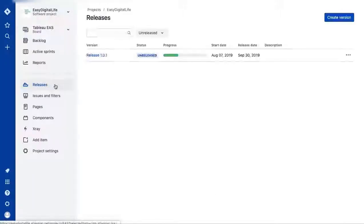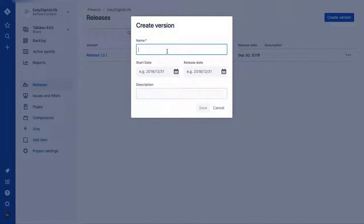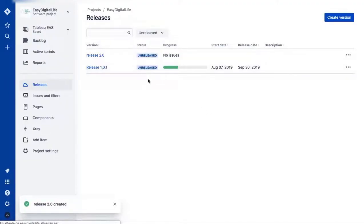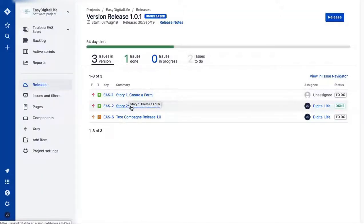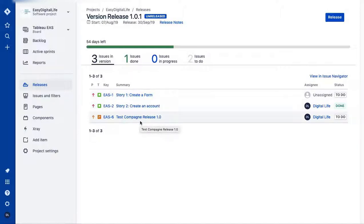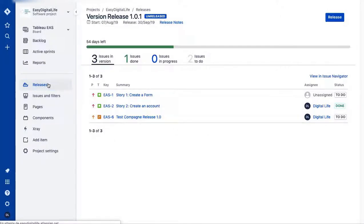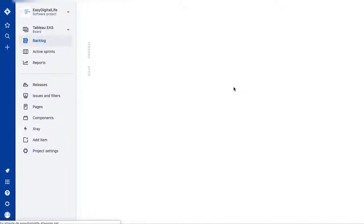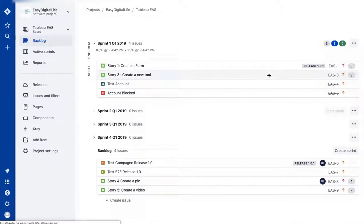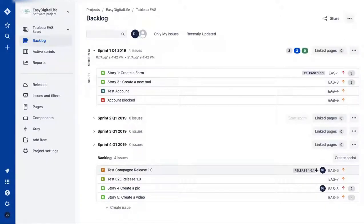In the Releases section, you can create a version with a name like 'Release 2.0,' set dates, and save it. Looking at one I've already created, you can see all the user stories assigned to that release. In the backlog, you'll see a small tag showing the release, such as 'Release 1.1.0.1.'